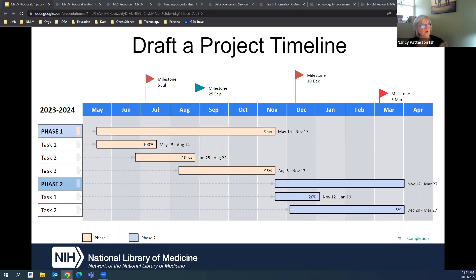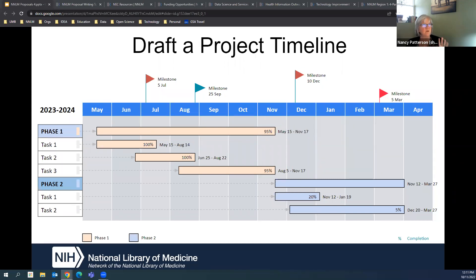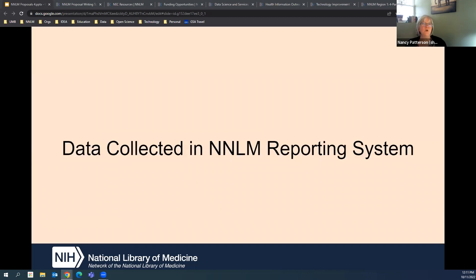As a reminder, we talked in a previous webinar about drafting a project timeline and plotting everything out starting at the end and moving backwards. Make sure you've built reporting into your project timeline — it's as critical as the other parts of the project. Also build in specific time for collecting data you're hoping to gather.